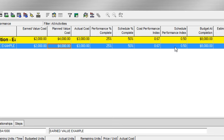If the index is less than 1, it indicates that less work was actually performed than was scheduled at this point in time. Another way to look at it is that for every dollar of physical work this project had planned to accomplish, only $0.50 was actually done.